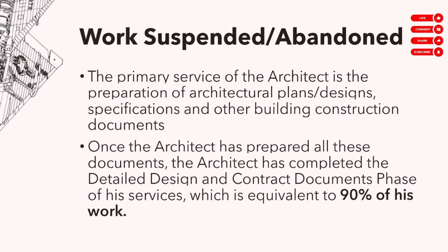Because the remainder after the contract document phase, yung bidding, yung periodic supervision, those are parang not the primary job. I mean, they're part of the job, but the primary job is the preparation of the plans. Okay, so when you're done with the plans, you're 90% done now because that's 90% of your work, and so you should collect 90% of your fee. Okay, I will emphasize that.